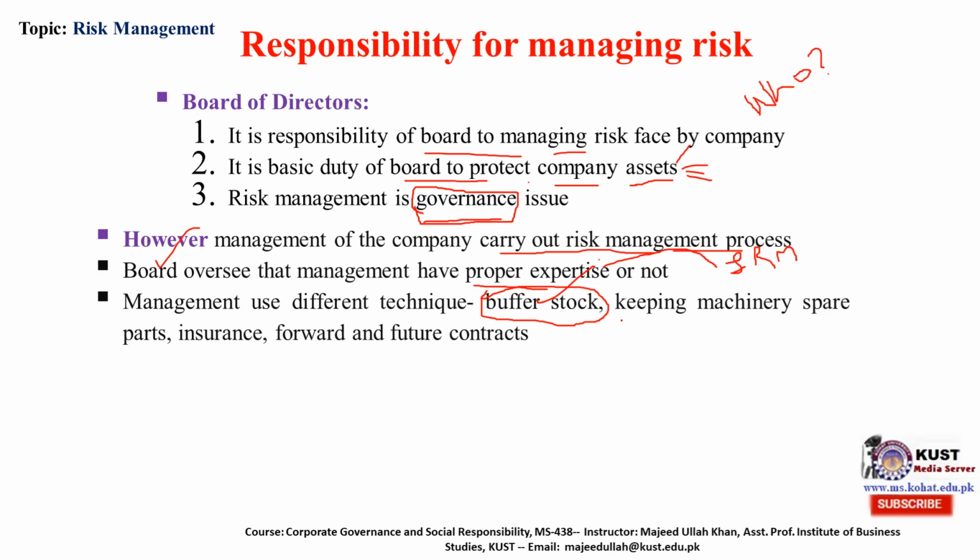In order to ensure smooth operation of the company, they keep machinery spare parts that were frequently replaced during the last 5 years. The other is, if there is no other means, then they can transfer the risk by insuring some of the assets of the company.